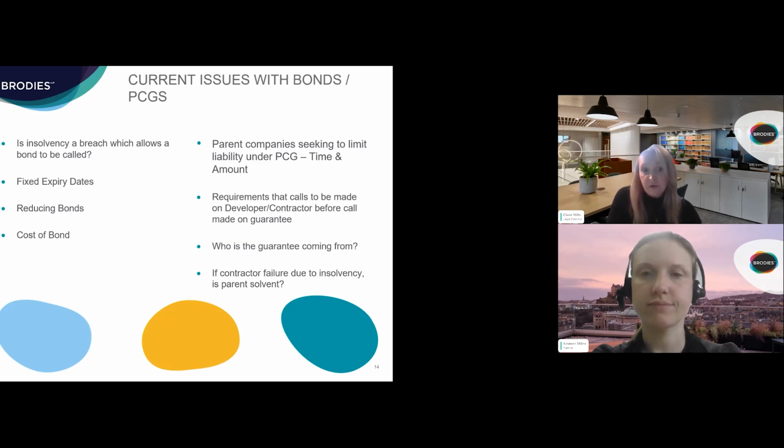In that scenario, do be aware, because if you know that the bond is going to have an ultimate long stop date in it, you can cater for that scenario in the development agreement, for example, by permitting the RSL to withhold a greater sum of retention if the bond falls away before the works have reached practical completion, to provide an alternative remedy.